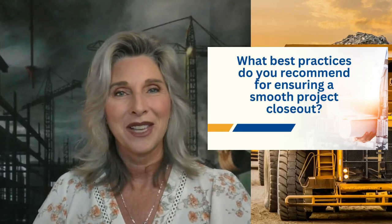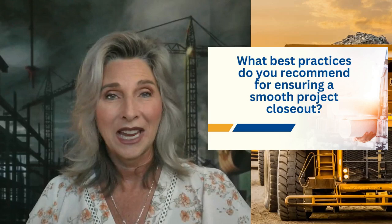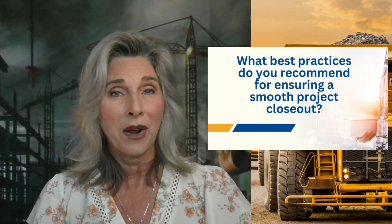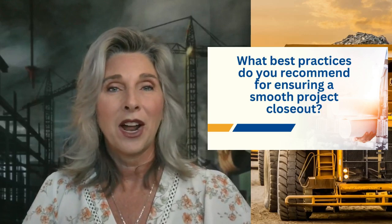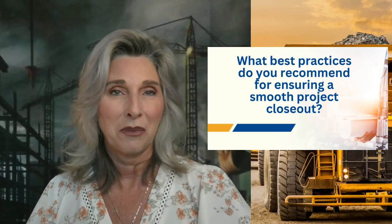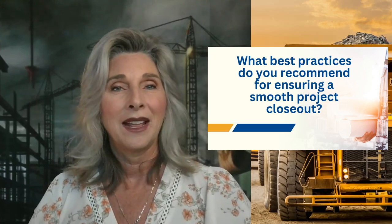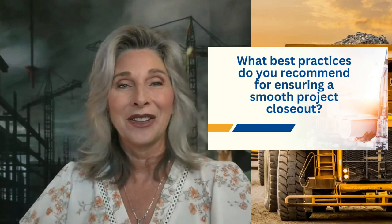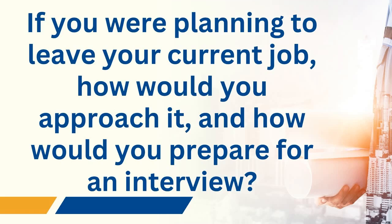a smooth project closeout. I would also encourage collaboration meetings and really keeping that communication open in those end days. A lot of times we're moving professionals who have been part of the project this whole time on to other projects, and then a new person is being brought in to close out the end of the project. So they might not have all of the history associated with the project. So being able to collaborate and keep them up to date is going to be really important in a smooth project closeout. So just a few ideas of things that you might want to try in the creation of a smooth project closeout. So let's move to the next question.